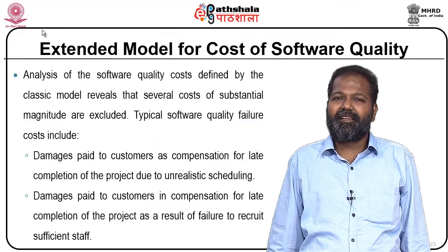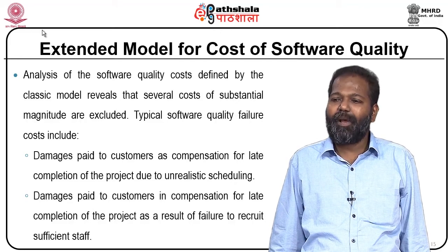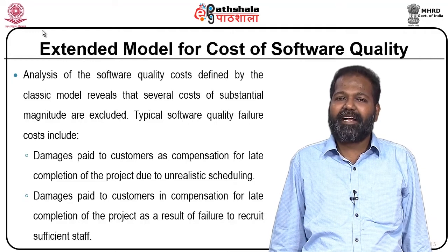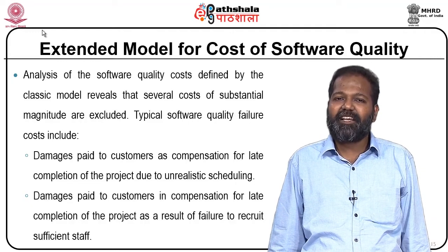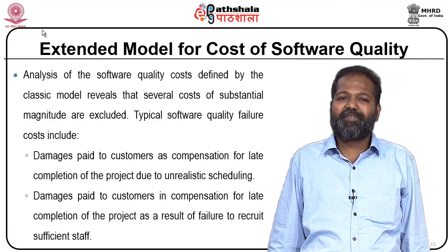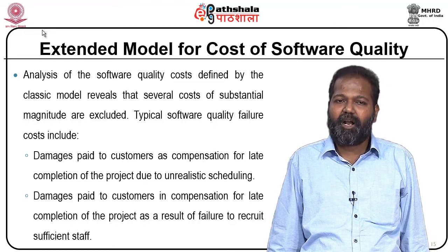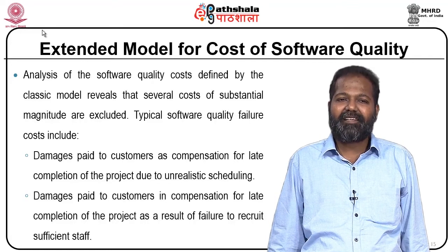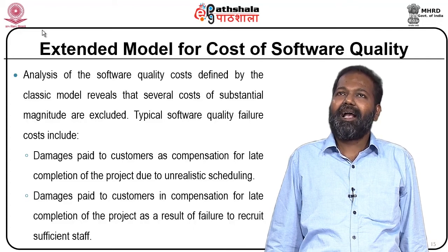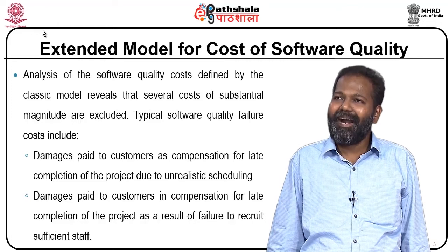Now we will discuss the extended model for cost of software quality. Analysis of the software quality costs defined by the classic model reveals that several costs of substantial magnitude are excluded. Typical software quality failure costs include damages paid to customers as compensation for late completion of the project due to unrealistic scheduling,